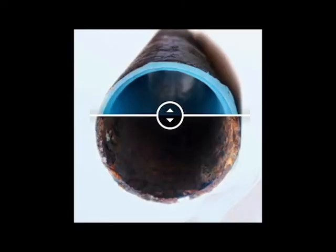So how do we do that? Because it was about 18 inches below ground and it was 6-inch concrete and you were digging right through the center of the building. So what we ended up doing is through consultation with the architect and the contractor, we found this company called NuFlow Coatings, N-U-F-L-O-W. And what they do is they burr out the interior of the cast iron to make it smooth and clean it up, and then they put a balloon through it, and then they spray an epoxy liner in, and they make it essentially a PVC pipe on the inside. So they essentially sleeve an epoxy PVC pipe inside cast iron.